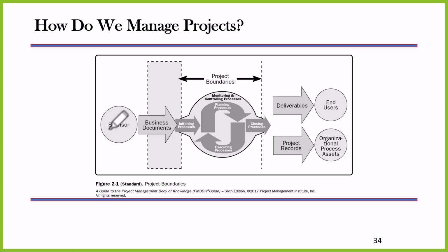But basically the way we start off a project is we have the funding for the project. We establish the business documents, project vision, and so forth. We initiate the project charter. Every project, including Agile, needs a project charter. So we do that. Then we go on and we start planning a project. This will be a predictive type of project. Once we have enough planning done, we will start executing that project.